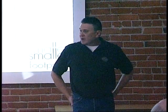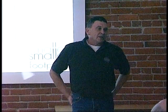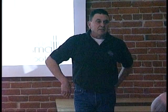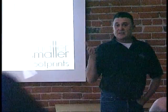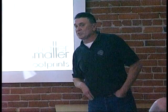And like Gary said, in hindsight, if he had to do it over again, he would give the commissioning agent much more clout, much more power, and the ability to say yes or no to things without having to run it through Gary first in this roundabout way. This guy said, this is the report, we need you to fix these things. Did you have any other questions on that?